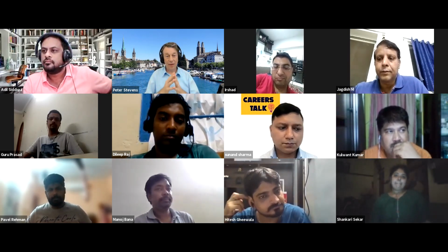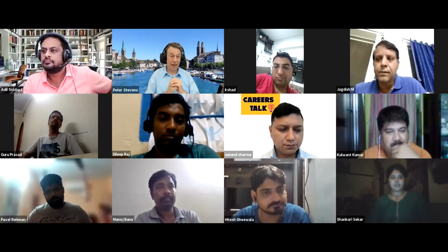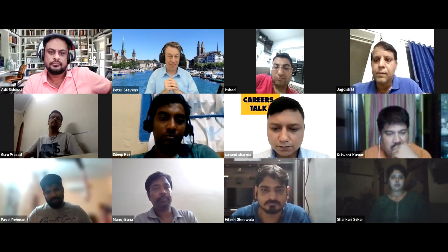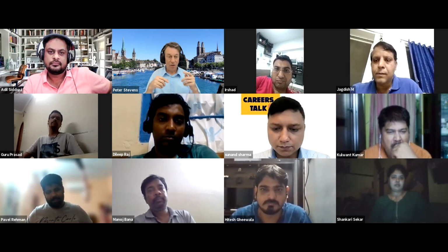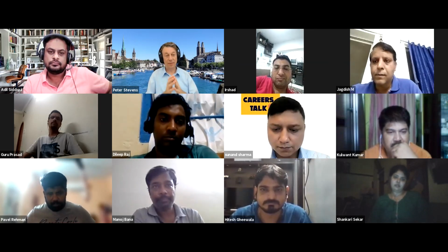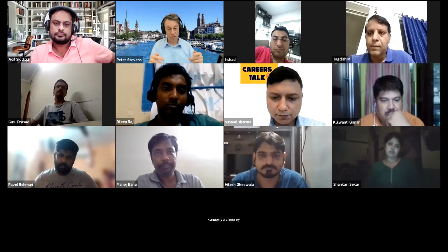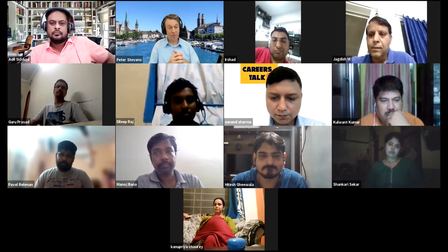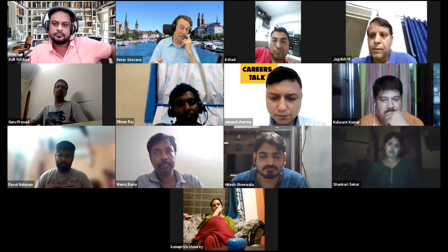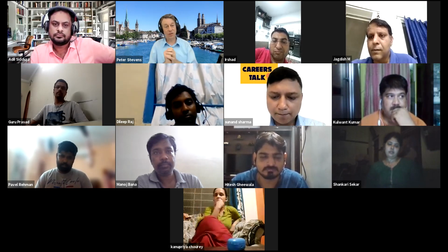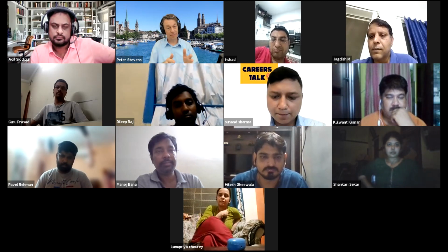So, what I do and what I have found, in fact, I just got hired as Chief Agility Officer for a startup here in Zurich today. This is my first official day on the job. What I would do is I would go in, and we have a tool in personal agility called the Stakeholder Canvas. And the idea is you do individual interviews with all of your stakeholders and ask them about the problem. The first question is about the stakeholder. Who are you? What are you doing? What's your interest in this project? What is our most important goal? What are you trying to achieve? What's making this difficult?